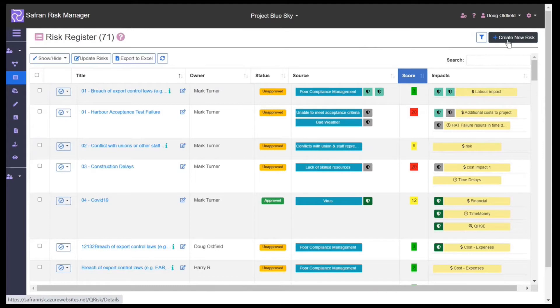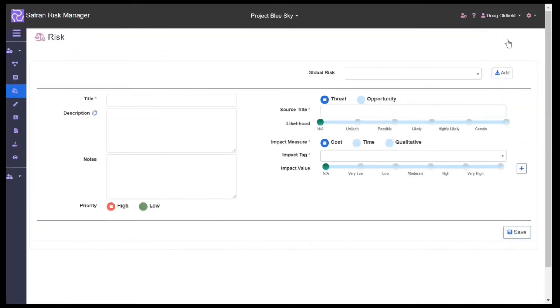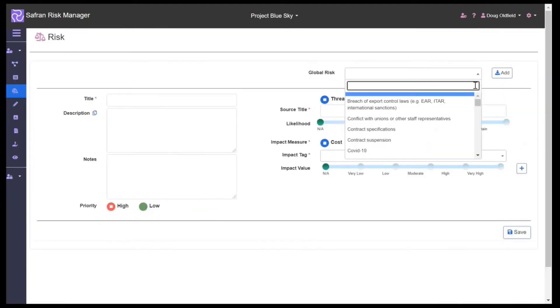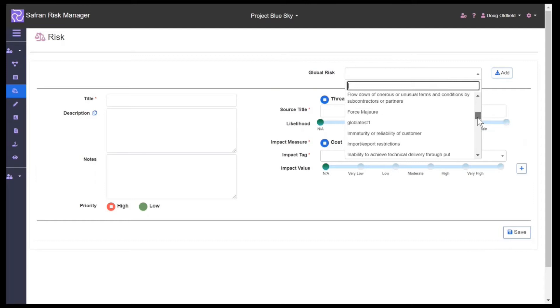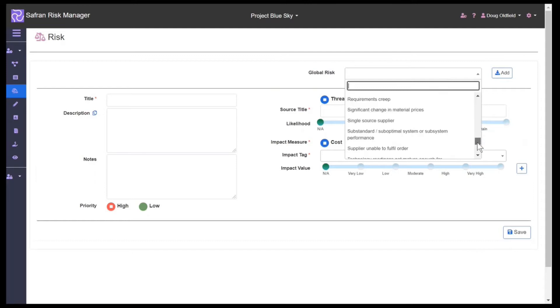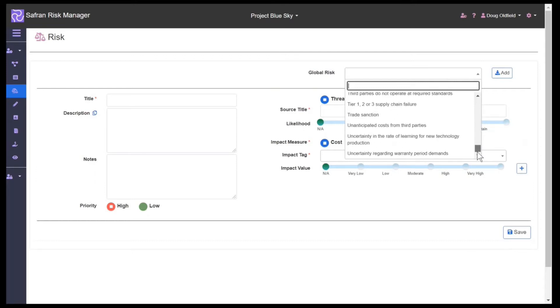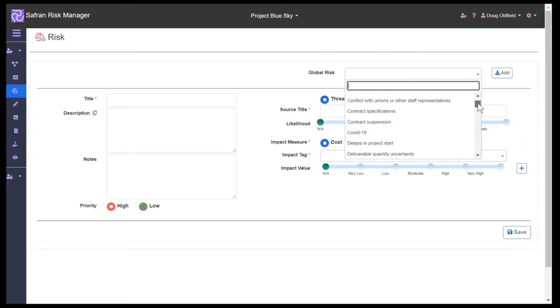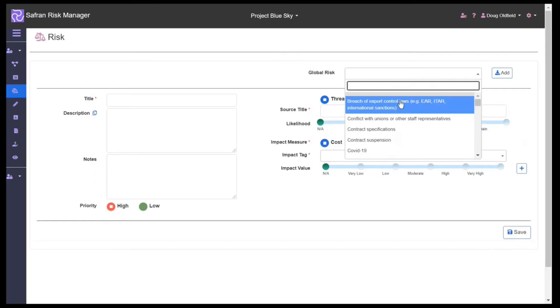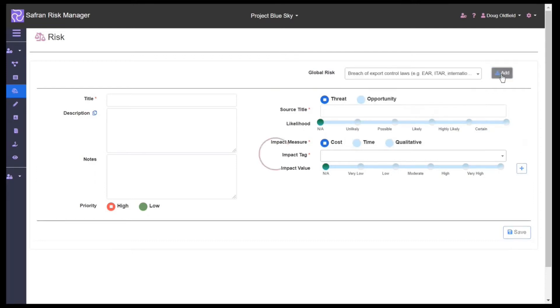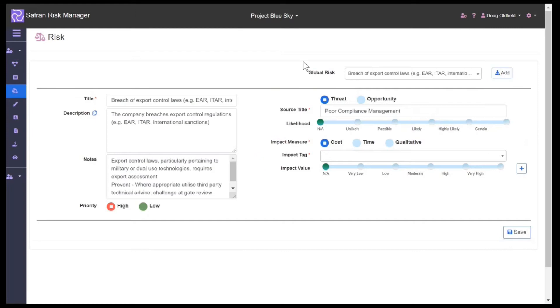To create a new risk, we click the button and we have a lessons learned repository which is generated from previous experience or projects, which we can use to pre-fill information, or we could create an entirely new risk from scratch.